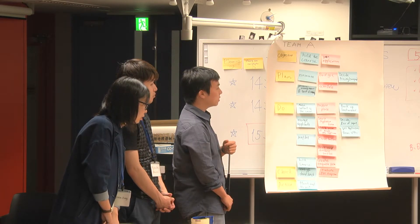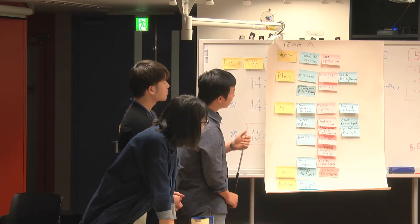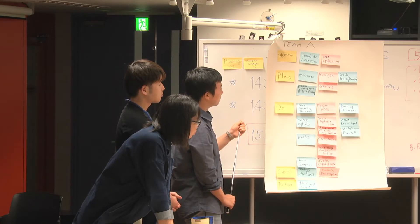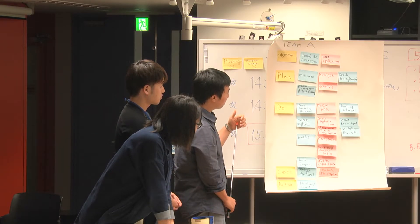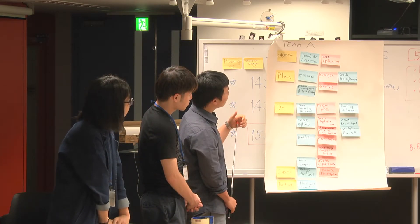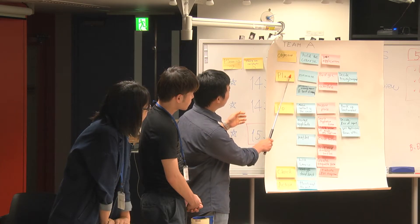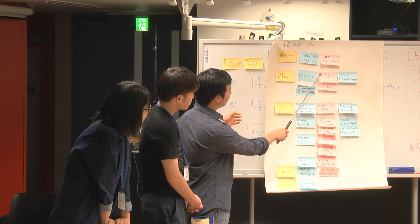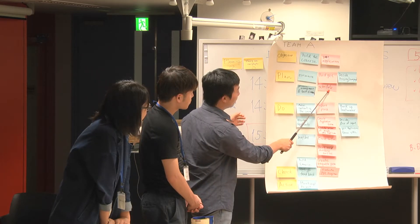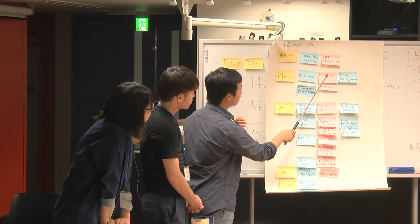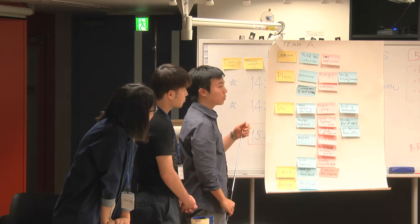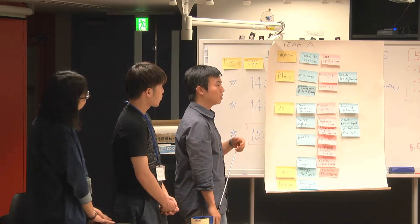What do you mean by levels? I mean, is this four levels? Are these four levels? Yeah, it's four levels. Maybe there's some misarranging. In the plan phase, at first we estimate, then we decide the budget based on the estimate and also the schedule. And pricing is also decided after we have the budget and schedule — we decide the pricing for the course and some campaigns if we should have them.